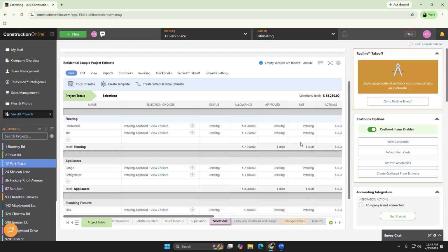Those types of connections, and being able to see the change orders and how they are affecting your job, where they are affecting the job, and whether or not those are linked to anything that currently exists in that estimate structure, is going to be really, really valuable in terms of your job costing reporting and being able to get insight into how your job is going, rather than just looking at the original bid and not really having good connectivity. That change order cost column that we talked about is going to show the value if it's been linked to that subcategory.